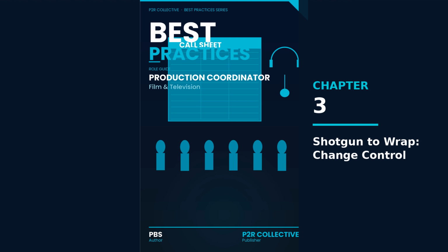5. Publish once with specifics, 2:30 p.m. Priya sends a message: hold scene 12 clean plate, client approval. Effective now. Scene 14 VFX pickup moves to TBD. New call, 3:30 p.m. for scene 10 B-roll pickup. Crew call remains 8 a.m. tomorrow as scheduled.